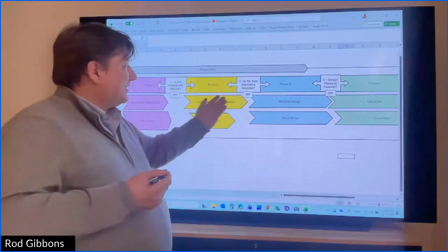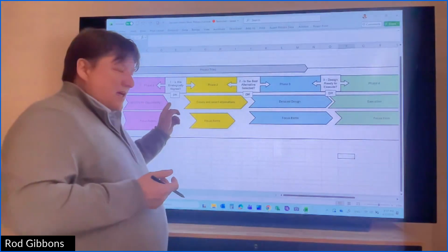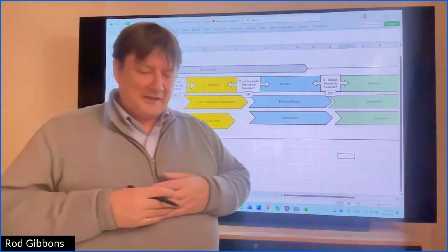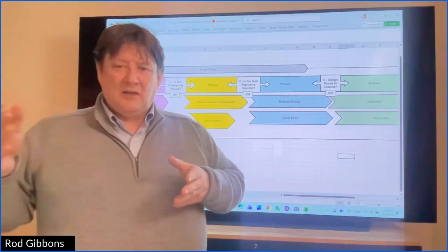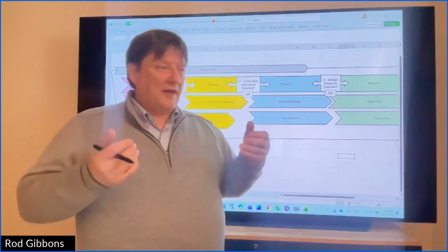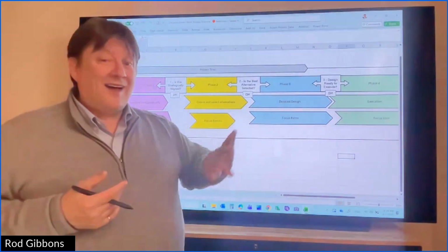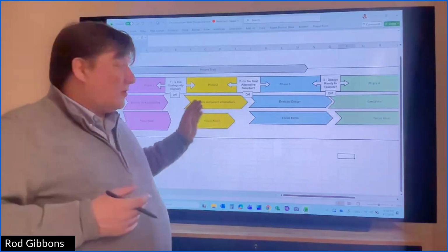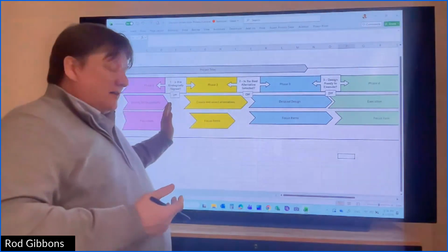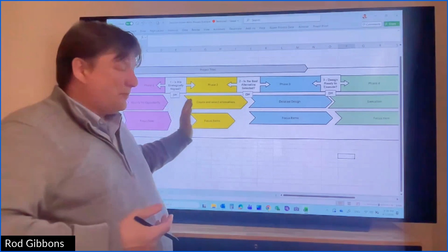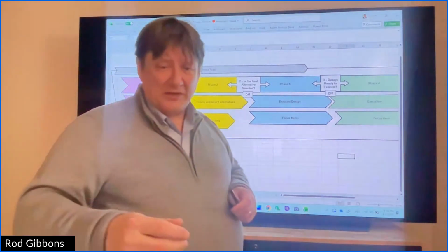And that's why things can change. But the value in doing that is, if I'm estimating the value of a project from $1 million to 2 million, you can make $1 million on this project. If the decision maker says, okay, yeah, but I have 5 other projects that can make more than that, I'm not interested in this, then you know, no matter what alternatives you looked at, no matter what work you did, you would never get it above 2 million. You've saved yourself and your company a lot of effort to work this out. Better to know up front if someone is not strategically aligned.